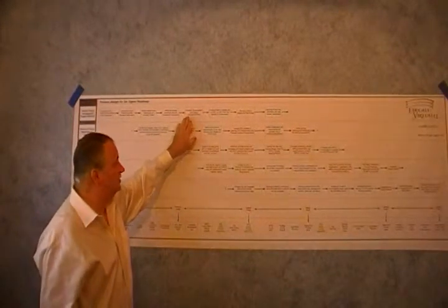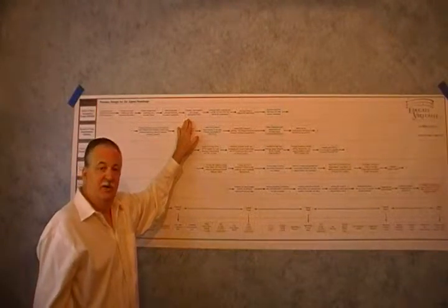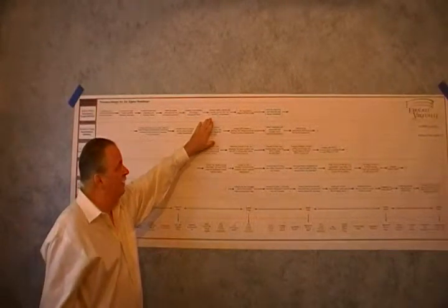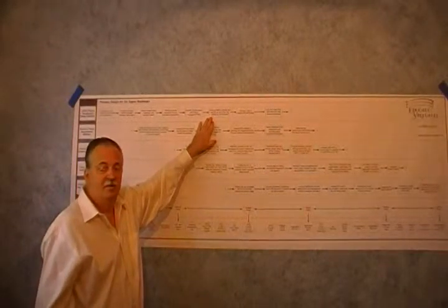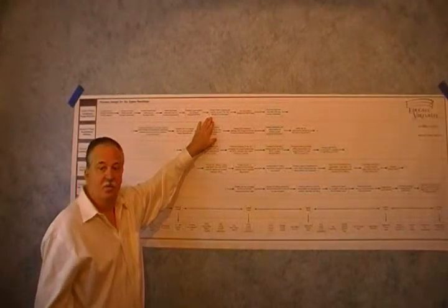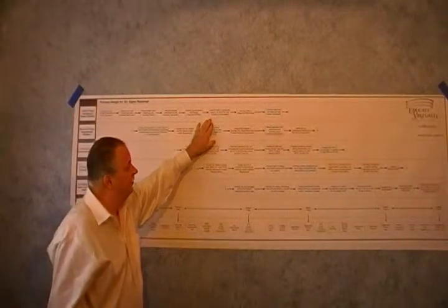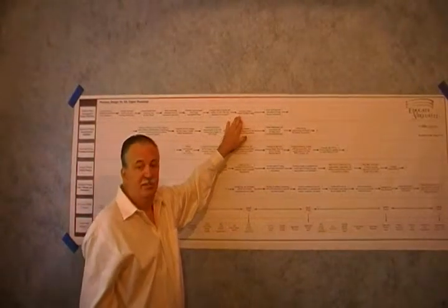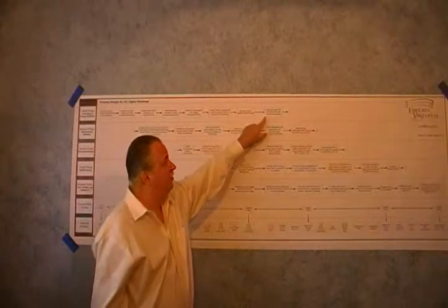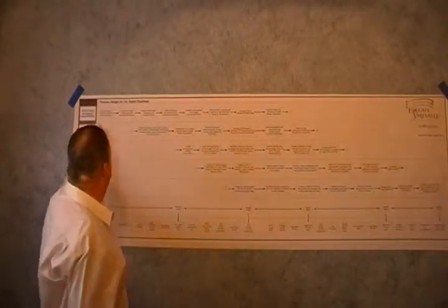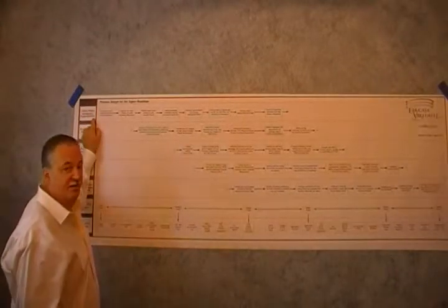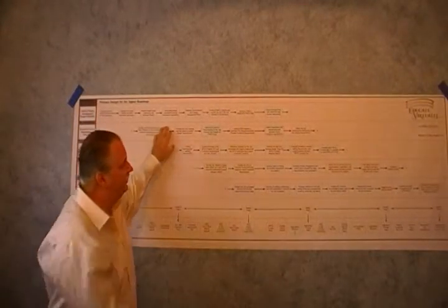You're going to be implementing change. It's very important to be able to communicate. FMEA, so you can understand the risks for that process that hasn't yet been developed. What are the risks if you develop it? What are the risks if you don't develop it? Develop a plan to mitigate the FMEA risks, and then build your project plan that includes all the phase gate deliverables. That is your development project definition. Then we move from that.